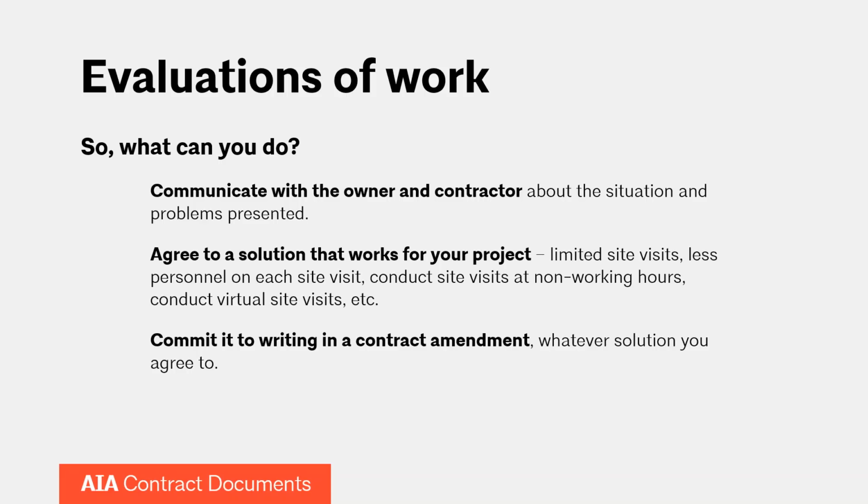And it could be a little bit more nuanced than either we're providing site visits as normal or we're not providing them at all. There are a lot of different options that I think folks should be thinking about right now. Is it possible to limit site visits in some way, maybe bring fewer people out to the site with you, or even conduct the site visits during non-working hours? If there's a time in the day where there's nobody there, and you can go out and visit the site with proper protective gear, maybe that's an accommodation that could work for all parties.